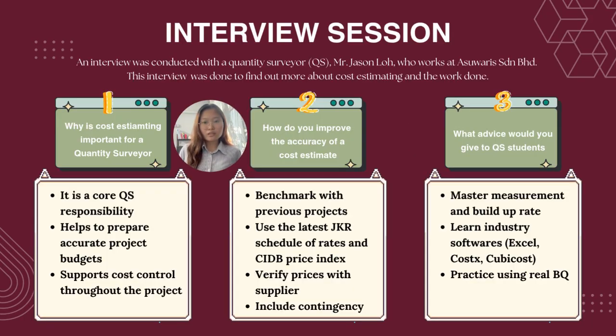Moreover, to gain industry insights, we interviewed Mr. Jason Long, a quantity surveyor at Asuwari Sendirian Berhad. He shared that cost estimating is a core responsibility of a QS, as it ensures accurate budgeting and effective cost control. To improve estimate accuracy, he recommended benchmarking with previous projects using the latest JKR and CIDB rates, verifying supplier prices, and including contingencies. Finally, he advised QS students to master measurement, learn industry software, and practice using real bills of quantities.